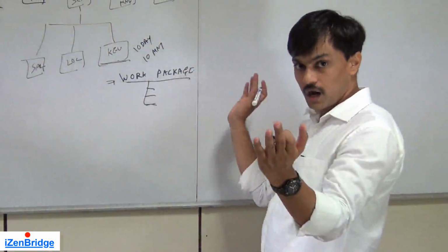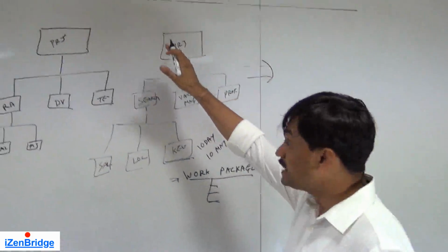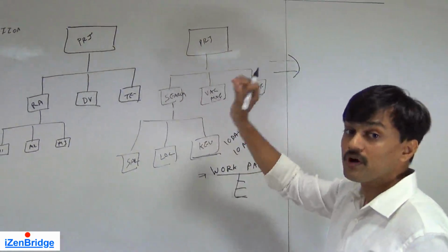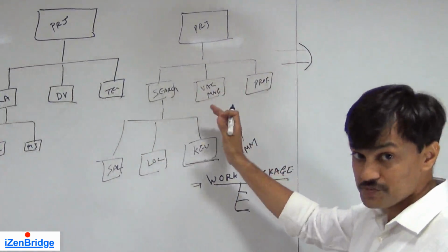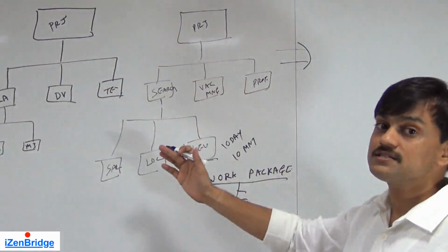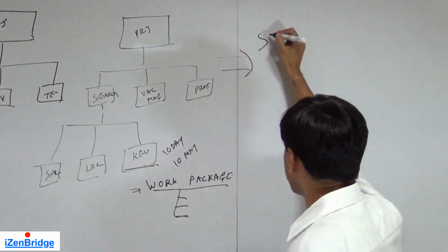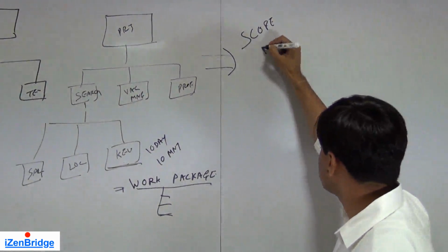So what do we get out of this? Create work breakdown structure is the last planning group process of project scope management, so it has to give us the scope baseline. We get the scope baseline, a very important baseline.